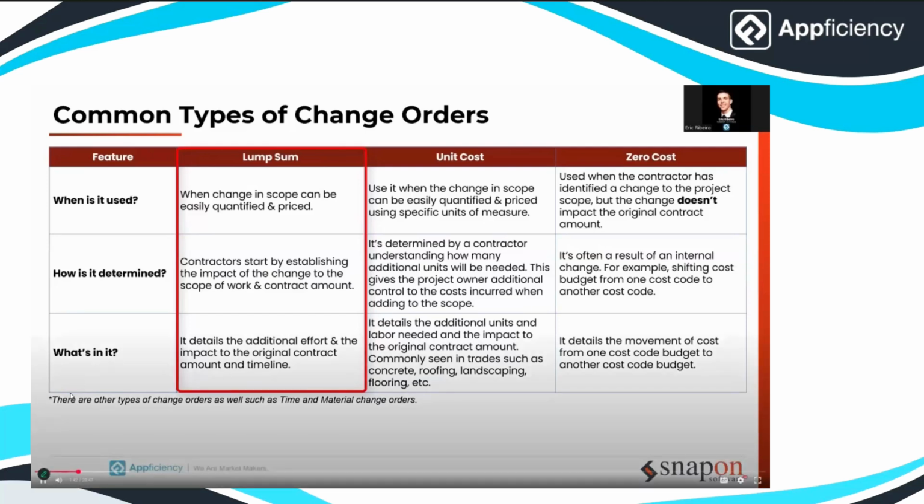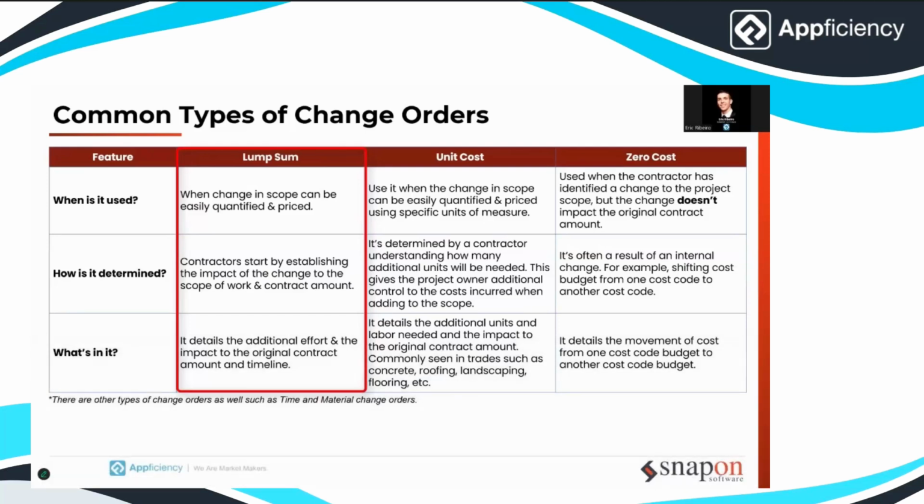And a big part of getting that approval is transparency. A lot of contracts spell out what markups are allowed on change order work. So for example, they might say you're allowed to apply, say, 10% for overhead and 5% for profit. If you're submitting a lump sum change order, it's common to be asked to show your estimated costs broken down by cost type, right? What's your breakdown for labor, material, equipment, and how that final number was calculated based on those markups.